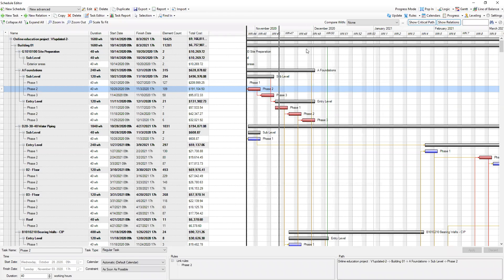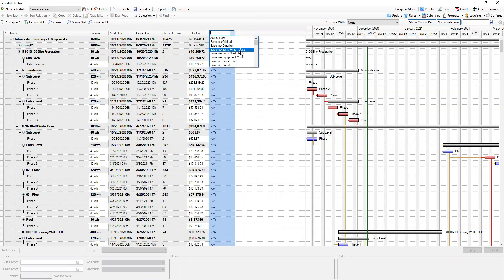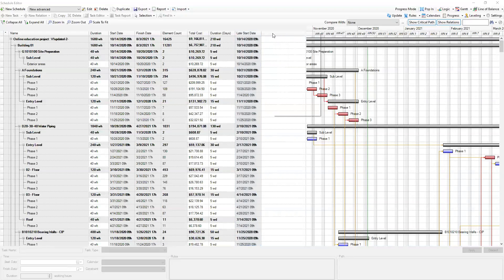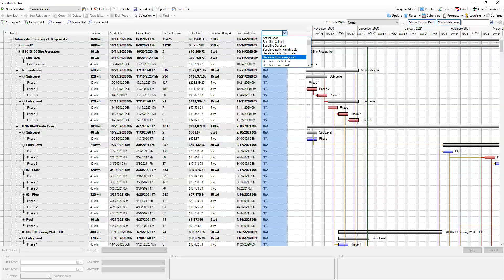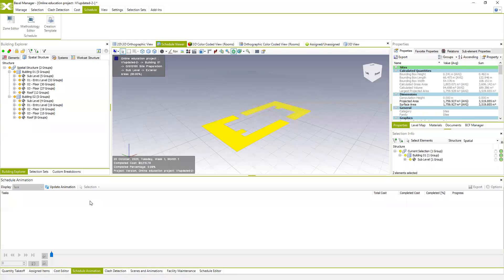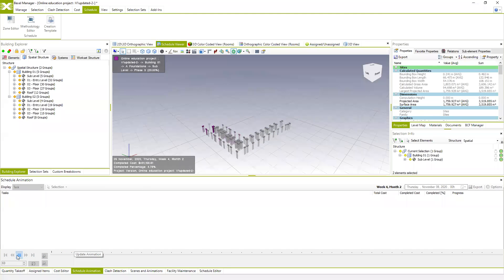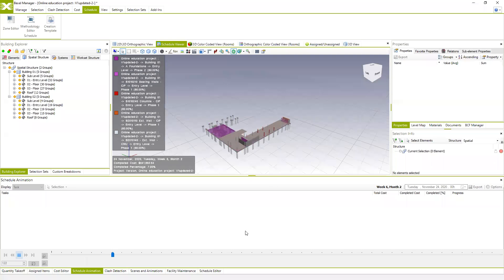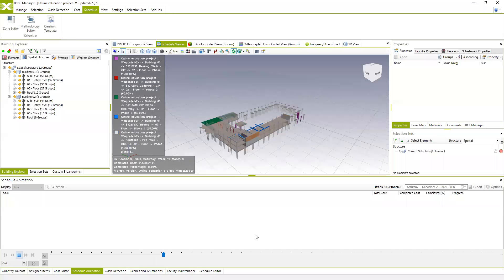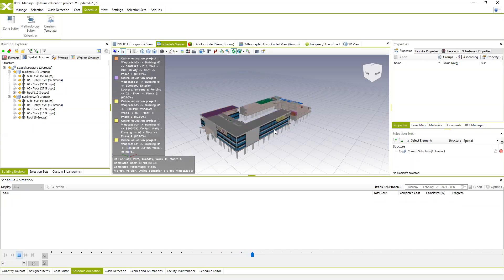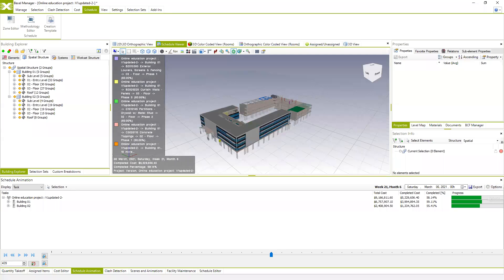Similarly to other scheduling tools, you see properties which can be presented as specific columns in the Gantt view. I can add columns for duration in days, late start, late finish, and so on — all this information is automatically available. If I pop this in and update the schedule, this is how the schedule looks now. You can see the facade starts when the second level of construction is completed. All automatically generated based on our methodology and zones.